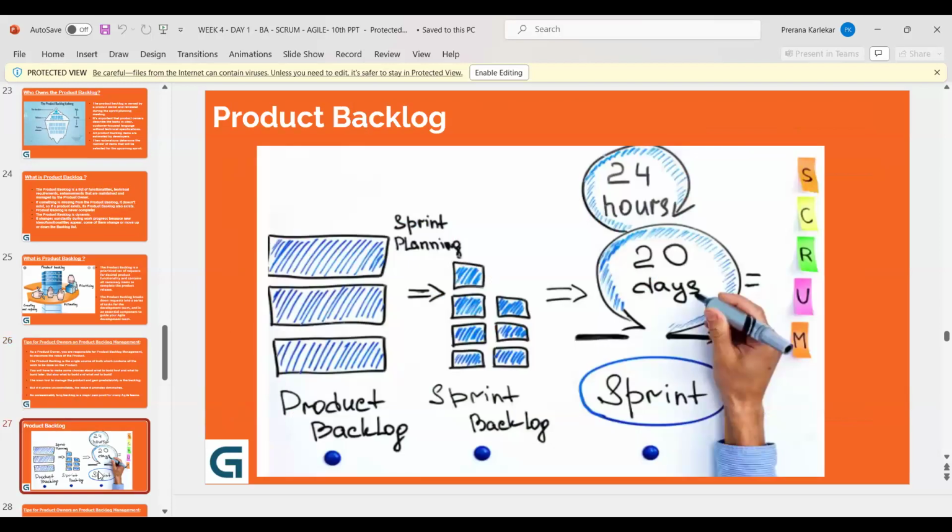What you see is the typical picture of the Scrum framework. The Scrum framework will have the stacked prioritized items, and these are taken inside the sprint planning meeting. They announce the sprint duration. This is 4 weeks, that is 5 working days each, that is 20 days.